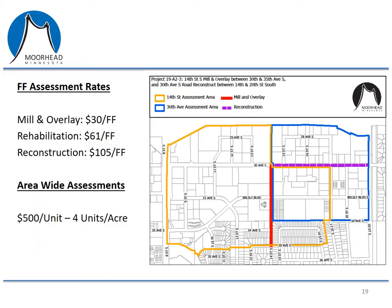This slide includes information on the assessment rates. We have two categories: front footage special assessment rates and the area-wide assessment rate. The front footage assessment is levied against properties next to the road that has the project, and the rate depends on the type of work being done. If the city is doing a mill and overlay, it's $30 a front foot; if it's a rehab, it's $61 a front foot; and if it's a reconstruction, it's $105 a front foot. The focus for this project is on the mill and overlay rate, which applies to 14th Street, and the reconstruction rate, which applies to properties on 30th Avenue South. The area-wide assessment is a flat $500 for residential properties, and for commercial properties it's $500 per quarter acre of property. I'll go through a couple of examples on the following slides.